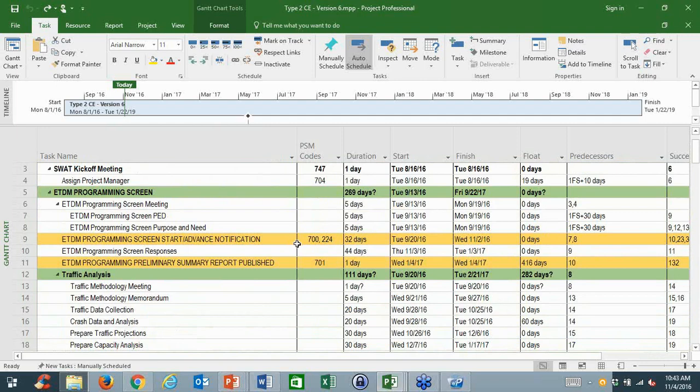And as to the false readings specifically, we were actually trying to correct that. In previous years, Type 2s and environmental assessments in particular had, quite frankly, bogus start dates. They would have NTP start dates for contracts and things like that. That's not when your PD&E actually started. So you would have PD&E studies that were Type 2s that were taking 4 to 5 years, when if you took out and actually figured out where the Type 2 started, it was much shorter. So we didn't want the false readings continued. It's one of the reasons why we separated it.